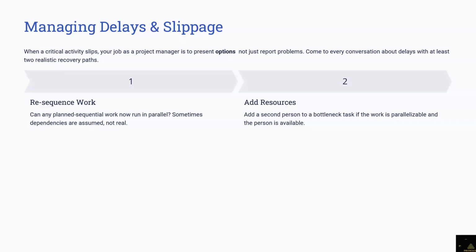So your response is, you don't respond "oh no" to the client. You go back and pick up your schedule and see, okay, what can you do to finish by May 5th? That's when you start adding more resources to your schedule. If I put 2 resources here, what's going to happen? An activity that's going to be 10 days is not going to be 5 days.